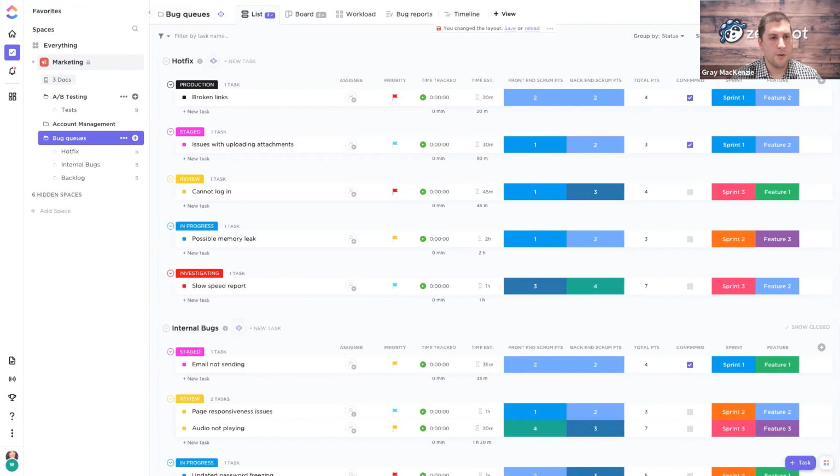Yeah. So there's not a direct integration from ClickUp right now to something like QuickBooks or Xero. Often what happens, and this really depends on how people bill, is that the majority of clients that we're working with are not primarily or predominantly billing on an hourly basis. But for ones that do, if they just need that full scope to be included in the invoice, but they're not going line by line, what they'll typically do is take a screenshot when that monthly invoice is due, which a lot of times they're getting triggered on from the account dashboard. They'll take a screenshot of the time tracked by client, that one dashboard that we looked at. They'll break it down list by list and then attach that screenshot to the invoice.